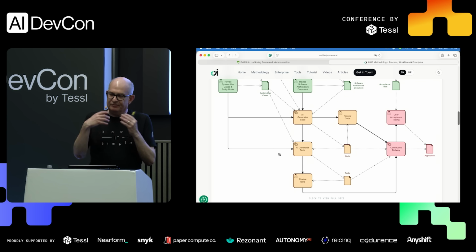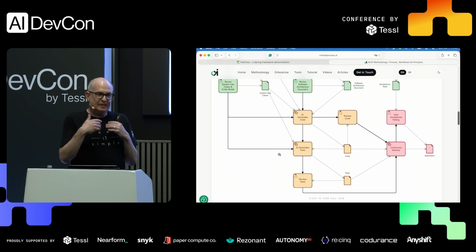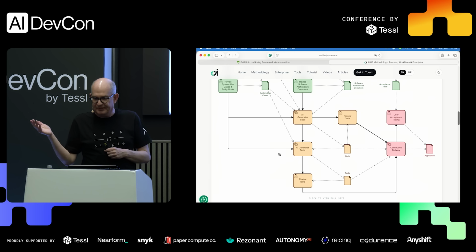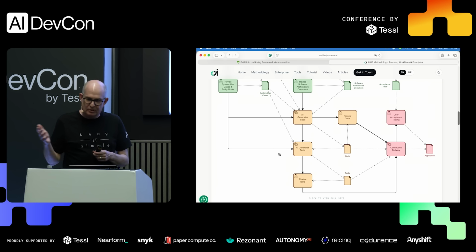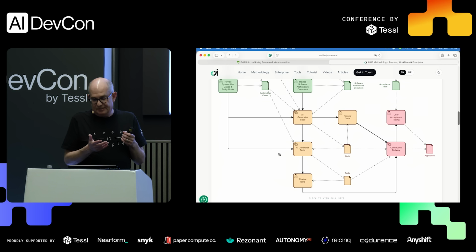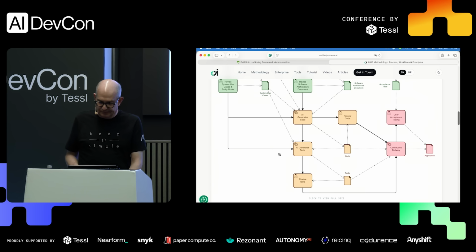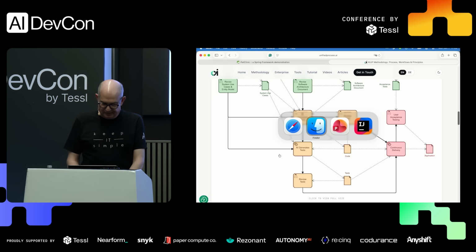So that means if you have the product management or the inventory part, if that doesn't work, that's probably not even a problem because people that are working with that inventory management system, they can just go and grab a coffee. If the order management system doesn't work, that's more of a problem because then the company probably will lose money, right? So you should do risk management and then decide how much review your code probably needs. But that's not different from AI or manual-driven development. That's just how it works.